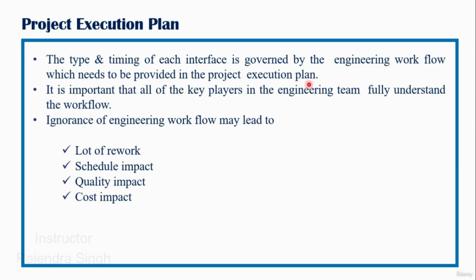As I have mentioned earlier, the type and the timing for each interface, when the interdisciplinary interface will happen and what type of interface it will be, is already clearly mentioned in the IDC matrix or the document distribution matrix before the start of the project. And each engineering workflow needs to strictly adhere to this document so as to ensure the delivery of the deliverable with respect to integrity, quality, and right information.